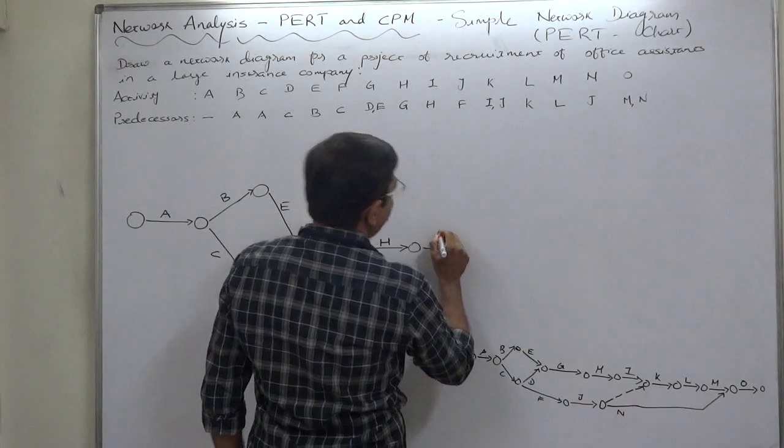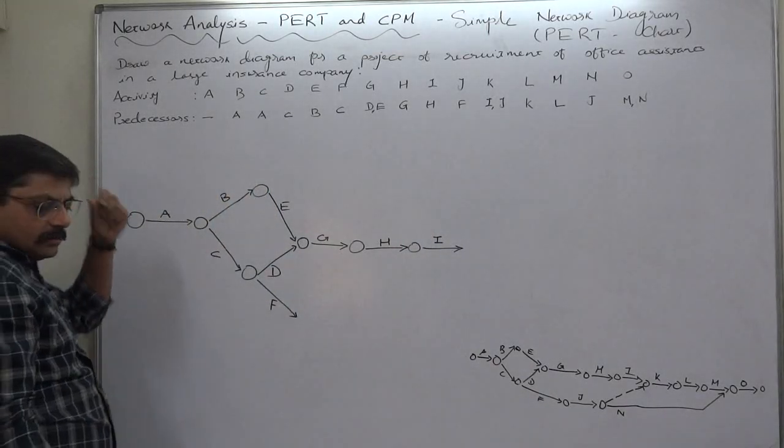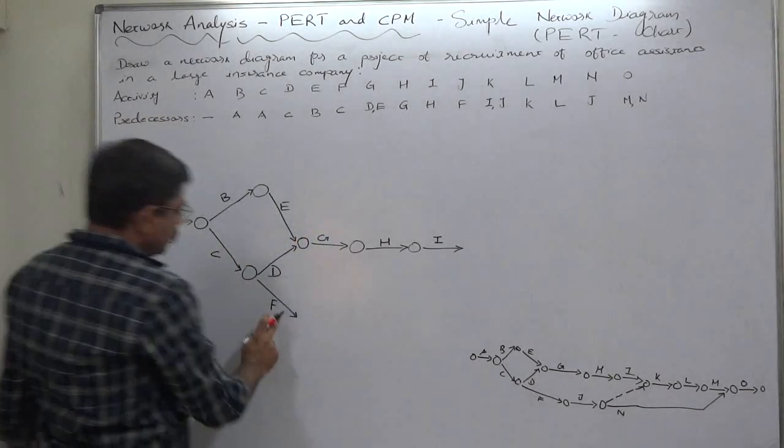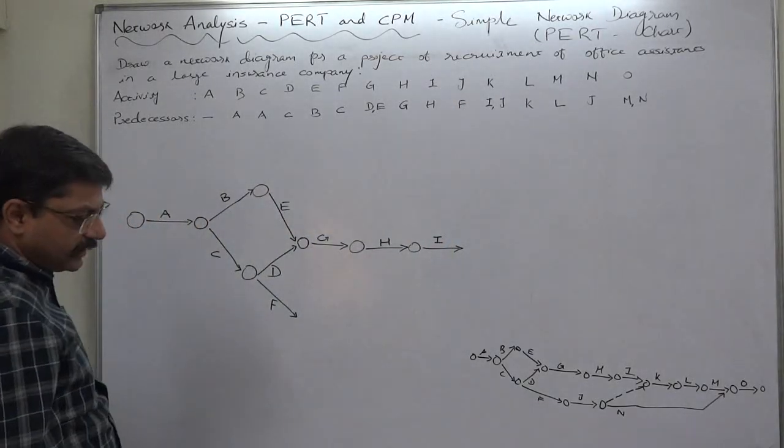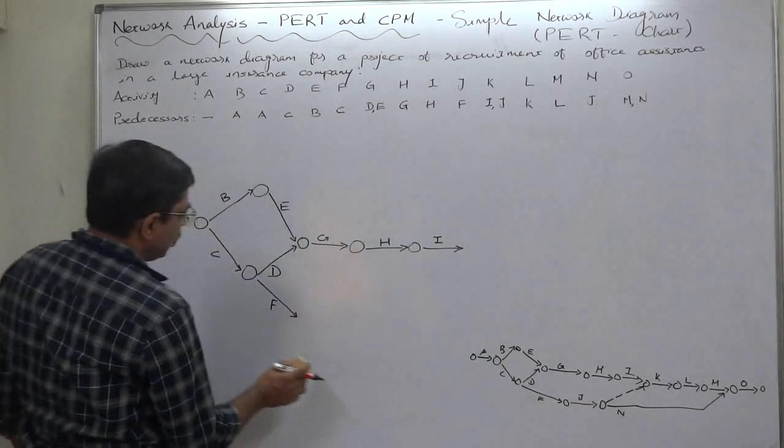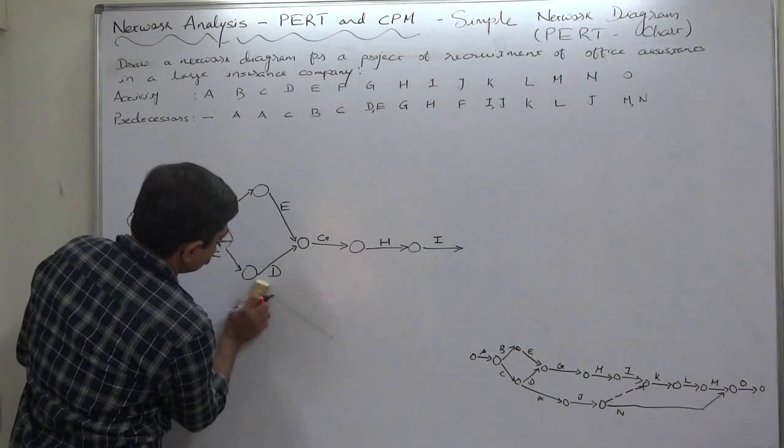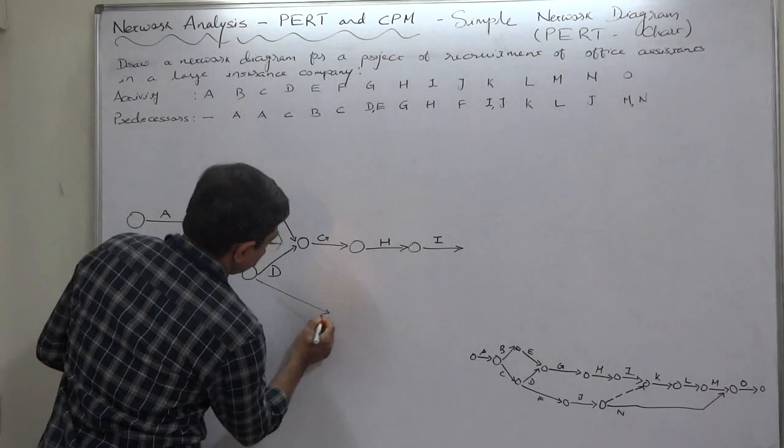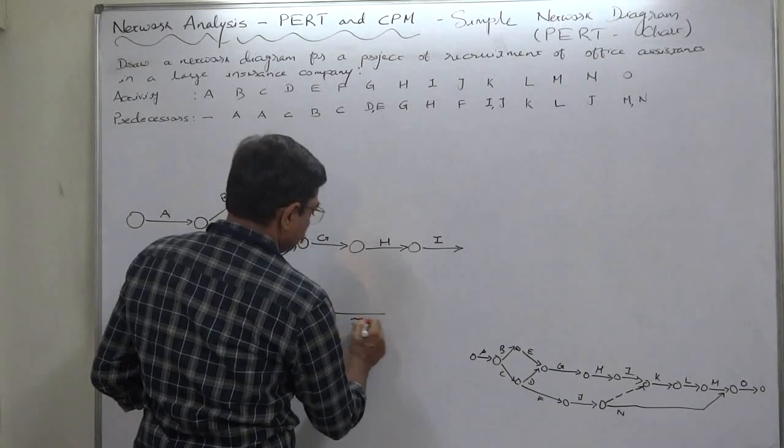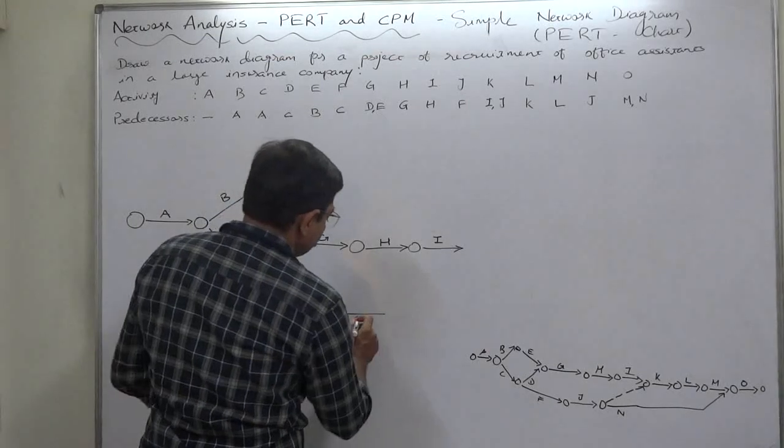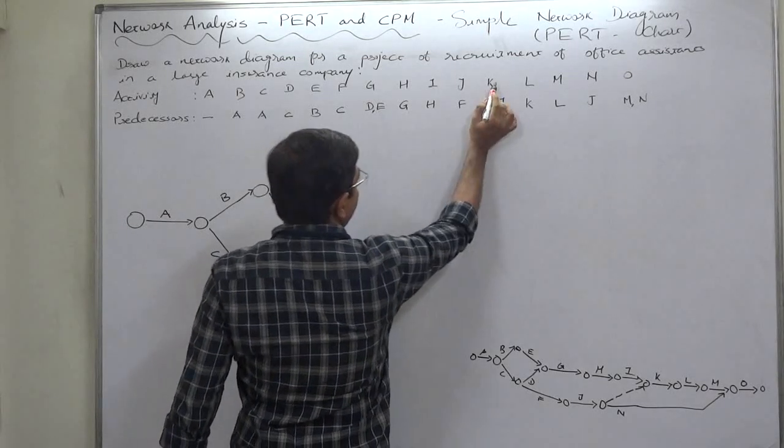Now I becomes predecessor of K together with J, so first we have to go for J. J starts after completing F, so let's show it in that way.